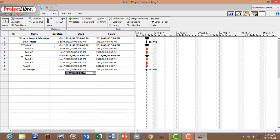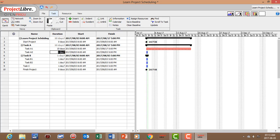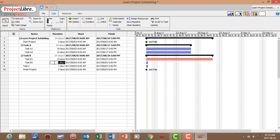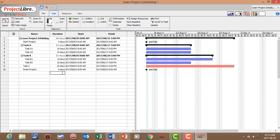The next step is to include durations. Task A1 gets a duration of 10 days, A2 gets 10 days, B1 gets 15 days, B2 gets 10 days, and Task C gets 20 days. Now we've included the duration for each of the tasks.